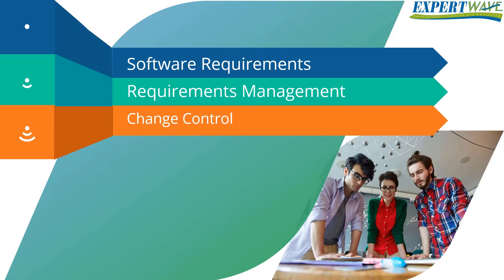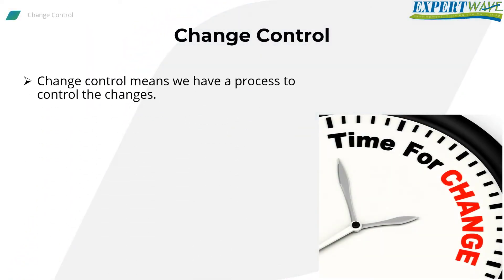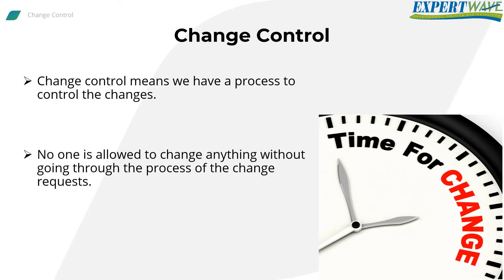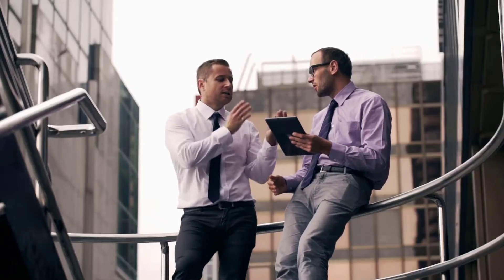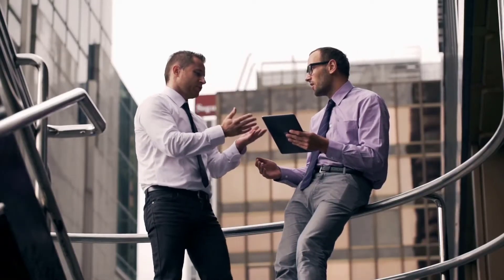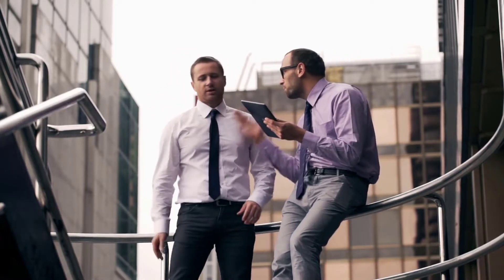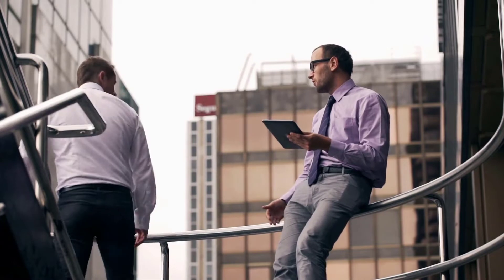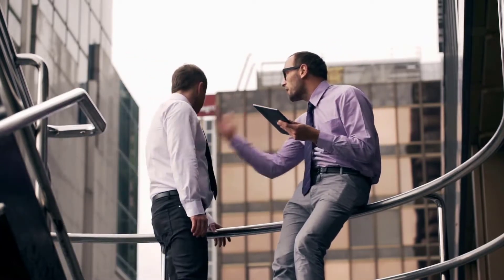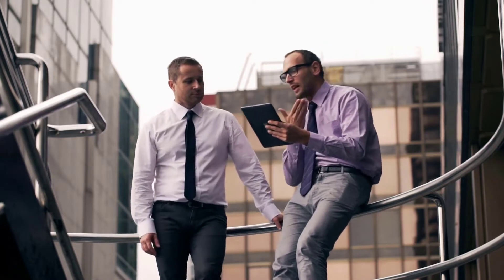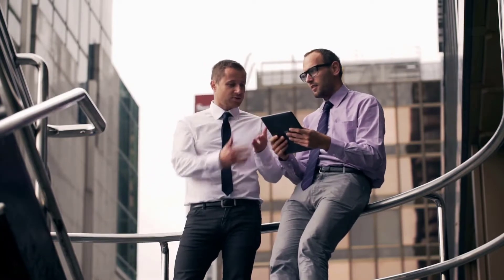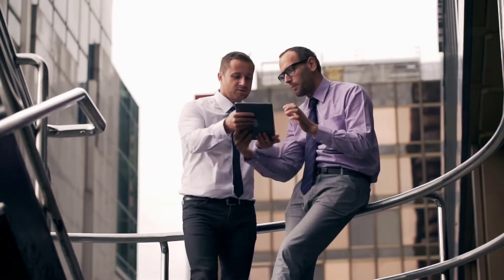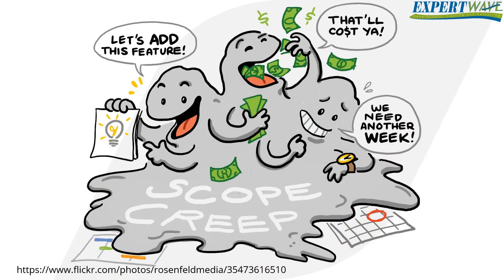Change control means we have a process to control changes. No one is allowed to change anything without going through the process of change requests. Many times I faced a situation where a developer added something to the scope of requirements without telling anyone, just because he felt good about it or because the code was already available. Usually the developer has good intentions, but software can't be managed with intentions. Adding unnecessary features is a common phenomenon known as feature creep or scope creep.